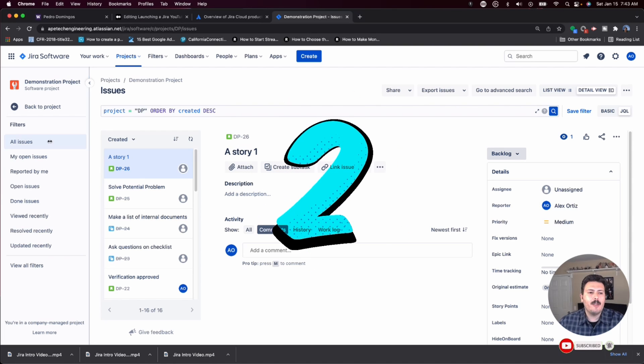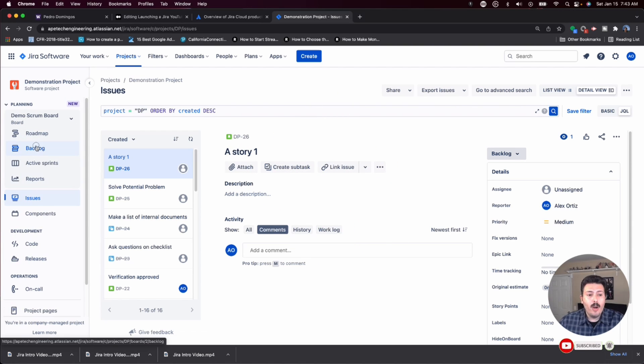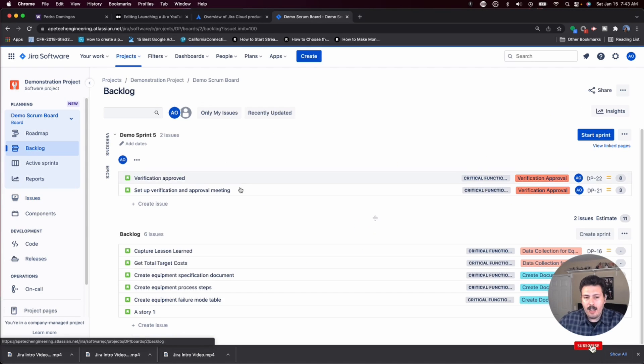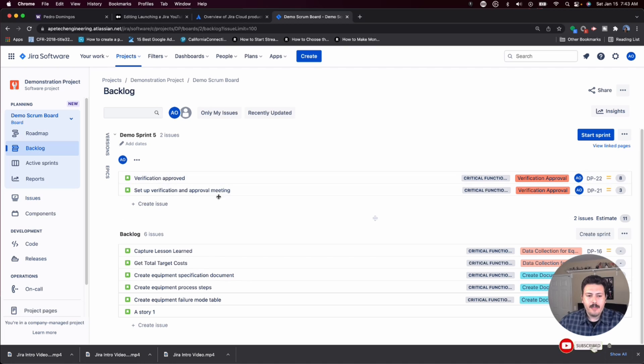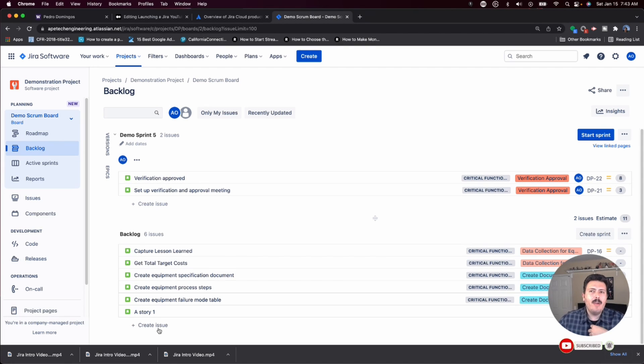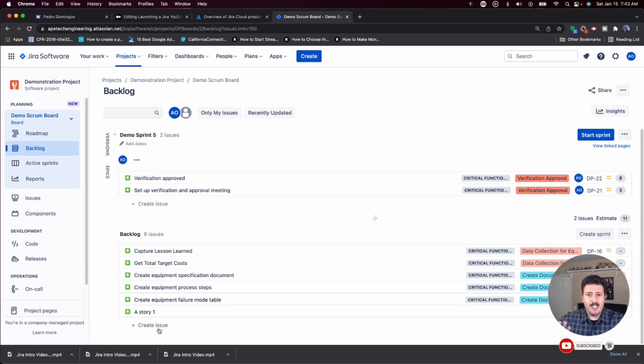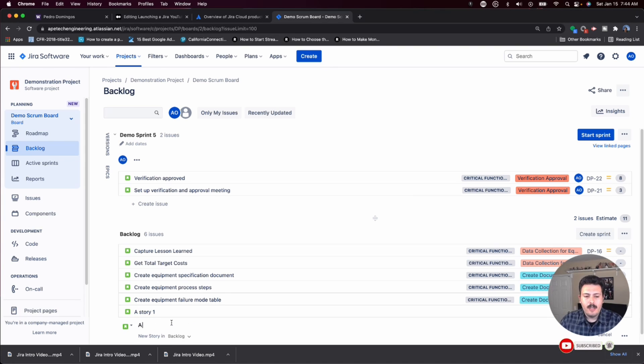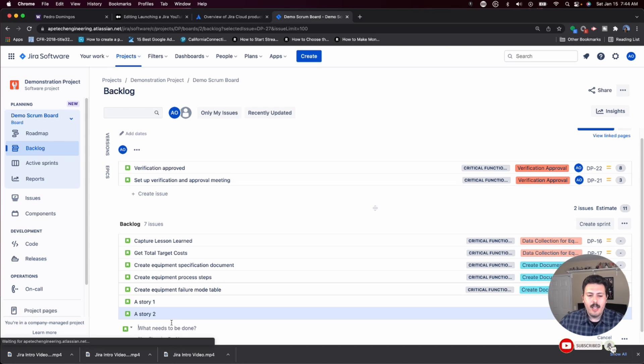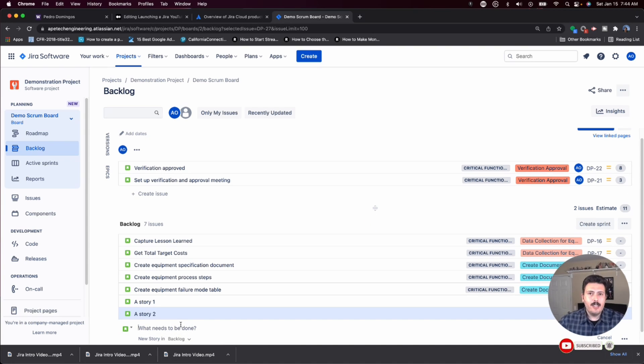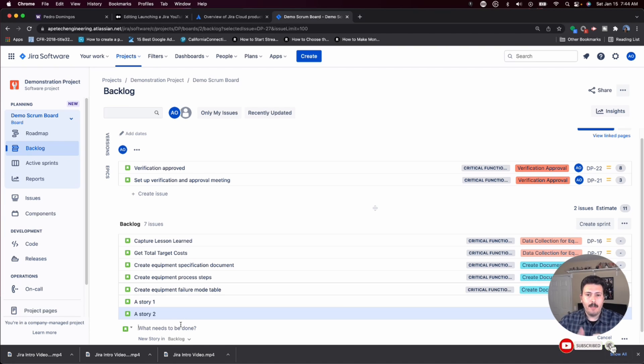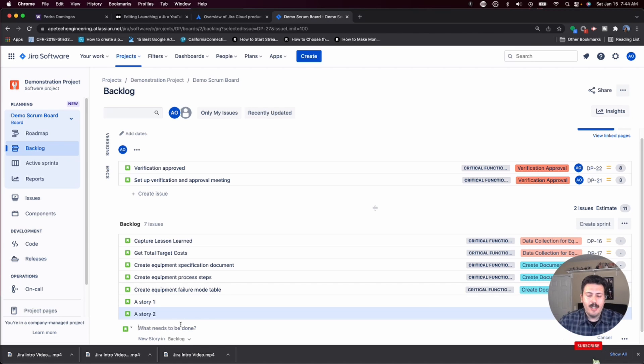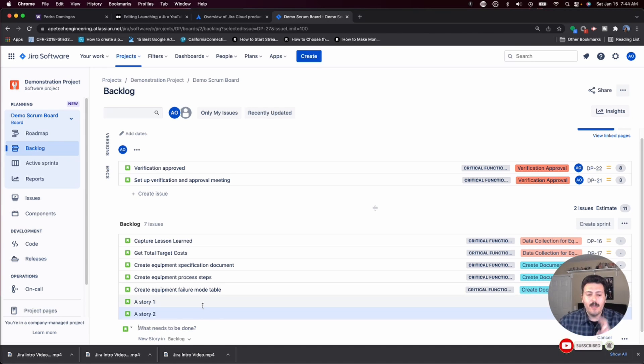Method number two of creating an issue is you're going to want to go to the backlog of an issue. If you look at either the sprint or at the backlog, I recommend if you're not in sprint planning mode, as in you're not in your sprint planning session or meeting, I recommend you just stick to adding issues to the backlog. You can just put a title here, story two, and when I hit enter, it is now going to create that story here. Notice a couple of things. One, I didn't have to pick the issue type and I didn't have to pick the project. I didn't have to pick the project because I'm already in the project, so Jira again is assuming if I'm clicking create issue, I'm going to do it here.